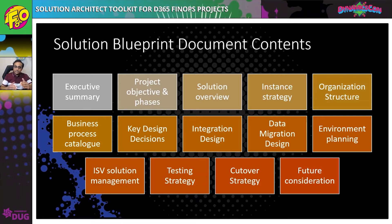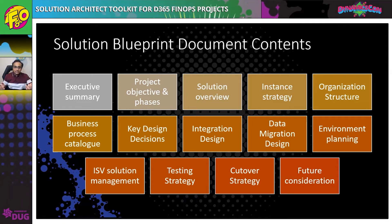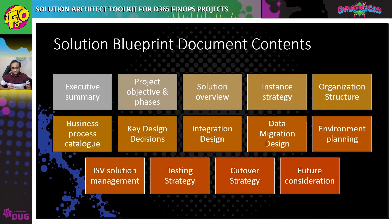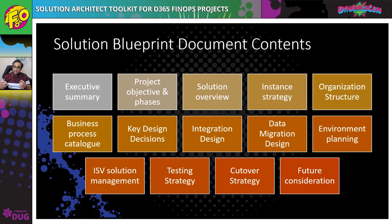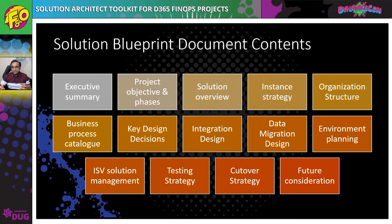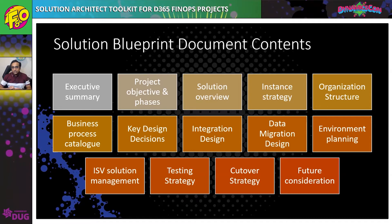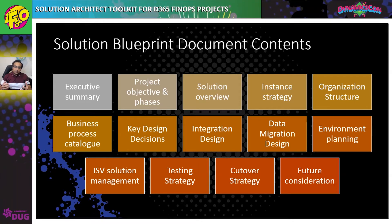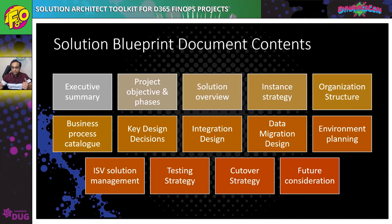The blueprint document also covers project objectives, various project phases, and a solution overview discussing which Dynamics applications are part of the solution and what the integration layers are. Then there is instance strategy — an important section because it can add a lot of cost if not decided in advance. For example, do you need a dedicated data migration environment or a dedicated performance testing environment? A high-level view of instance strategy helps identify the cost of hosting all environments throughout the project phases.